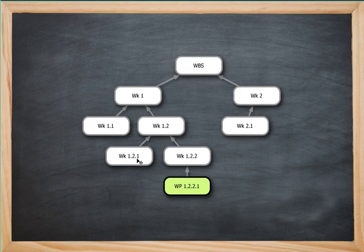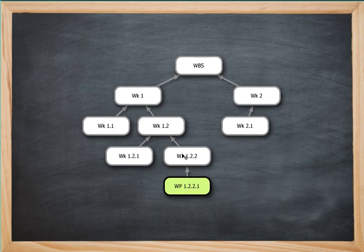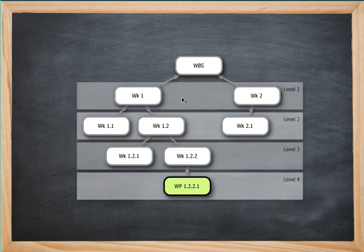So there's a Work 1.2.1 and a Work 1.2.2. Underneath Work 1.2.2, there is something called a Work Package, denoted as 1.2.2.1. Without the numbers, you're going to find great difficulty identifying specific work areas. Numbering them this way, much like outlining in grade school, really does help. You could view these also as levels, where the first level includes Work 1 and Work 2, Level 2 one level down, and so on.